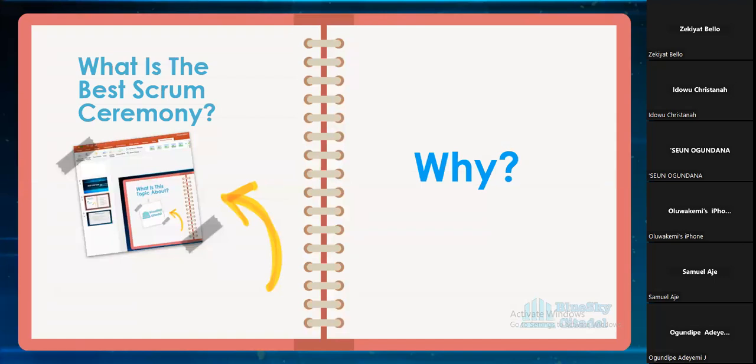But within 2.5 hours, 3 hours, we're done with the sprint planning because we've done refinement. But we need to go through everyone to be sure everything is okay. Sometimes 2 hours, depending. But my team that is just 7 in number, once we've done refinement, if we want to do sprint planning, 30 minutes, we're done. Sometimes 45 minutes max. So it just depends. The fact that the standard is 2 hours per week, which is 4 hours for every 2 weeks, doesn't mean you compulsorily use the 4 hours, but that's the standard.